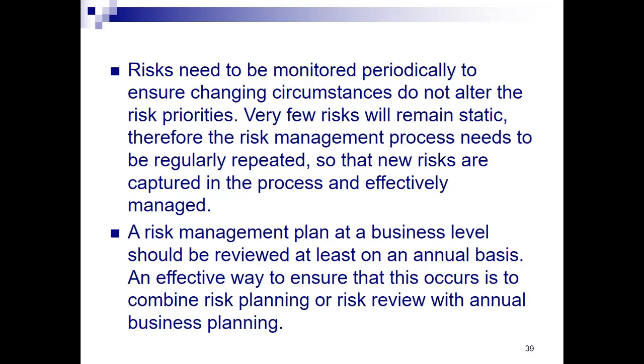Very few risks will remain the same or static. Therefore, the risk management process needs to be regularly repeated so that new risks are captured in the process and effectively managed. Therefore, just like the management functions from planning down to controlling, the risk management process is also a never-ending process. A risk management plan at the business level should be reviewed at least on an annual basis. It is very important. It's going to be at least annual because it's big. It's the business as a whole, as compared to a performance risk management plan, which can be done, for example, even weekly, depending on the jobs.